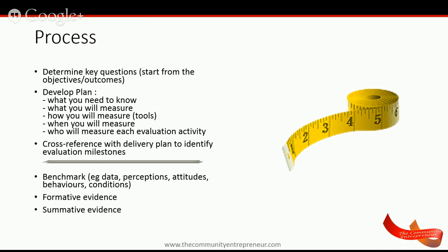And I would say, you can sit there and think of lots of questions you may want to ask, which are your overarching questions. But two things I would do. I would get your clues from the objectives and outcomes that you put into your project brief, or what you may have put into a funding application if you applied for funding. Start with the outcomes, and then from those outcomes, identify a maximum of 5 or 7 questions. Certainly don't ask too many more, because your evaluation process will become bigger than Ben-Hur. So determine a few key questions. Use some of the ideas that I've already mentioned as ways to frame how you might want to pitch the questions.